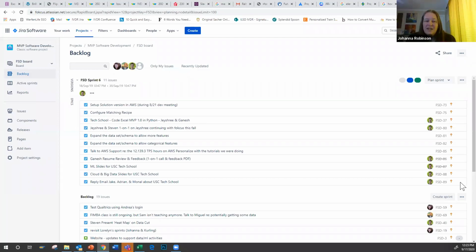So you can organize your project work in kind of 2-week chunks. And for me, I include things other than just software development tasks. I include everything. If you have to write a document, if you have to have a meeting, if you need to make a decision about something, I include all of those things. And you all saw that when we built the schedule last time, that those are the tasks. So you take the task list that you had from your project plan and you put them into Jira as tasks. And then you can group them in 2-week increments.